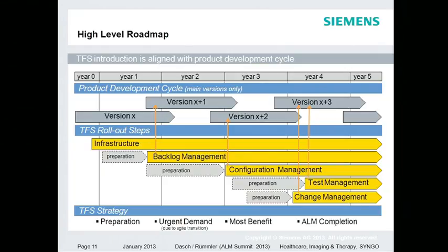And first of all, you require infrastructure. That's the first step. You cannot do it without the backends and all the servers installed. Then in parallel, we started doing some preparation work. By preparation, I mean thinking about how the concept should work, implementing a prototype, running with a small team, and doing a first pilot with a small project, for instance. And once we said this has proven to be stable for our efforts, we said, okay, roll it out to the huge project. And this happened over 1 year.